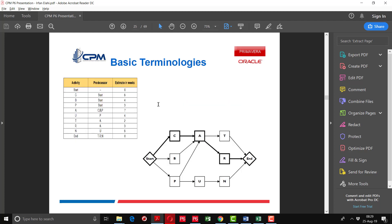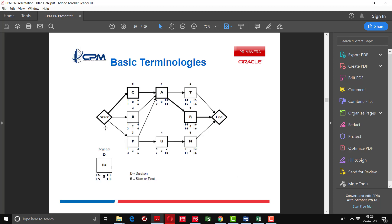Here comes a network diagram. Suppose you have a list of activities with their predecessors and duration estimates given in weeks or days. You have to build a network diagram based on this chart. Once the chart is prepared, you calculate the early start, early finish, late start, and late finish dates according to the forward pass and backward pass.